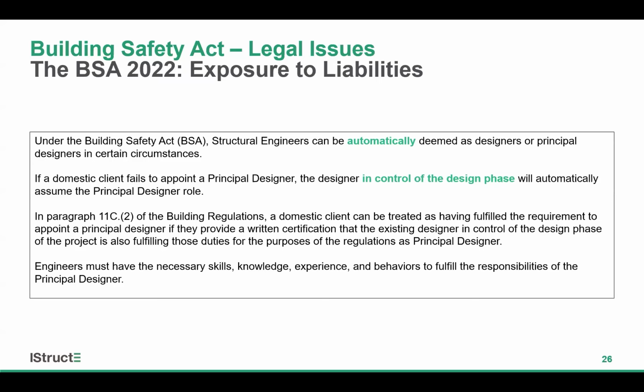So these are default assignments, meaning it happens by operation of the regulations if the client fails to make the explicit appointment. And this could easily apply to structural engineers depending upon the nature of the project and what they're doing. So again, steps must be taken to clarify at an early stage and make sure you know exactly what is being expected of you and that you know who the other duty holders are on the project. I'll talk a little more about those liabilities and how to minimise exposure shortly.